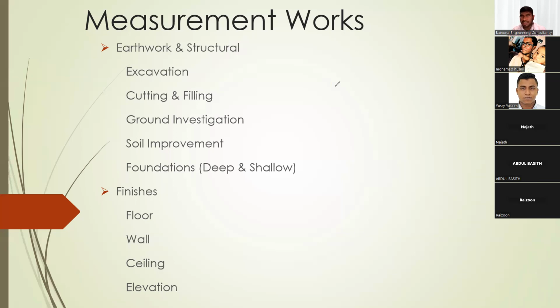Specially, as I mentioned earlier, that will show in your pricing preambles how to adjust the PC rate. So first of all, when you are in the position to adjust that, if some manager asks you to do the PC rate adjustment, first you have to go to your pricing preamble and read it. What does it say about the adjustment? How to do the adjustment? So accordingly, you have to work.